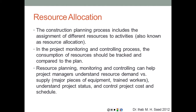Resource planning, monitoring, and controlling helps project managers understand resource demand versus supply for equipment, trained workers, and so on. For example, 500 man-hours of carpenters could be achieved by 500 carpenters each working one hour, or 50 carpenters each working ten hours, or any combination. Understanding this is essential to controlling project cost and schedule.